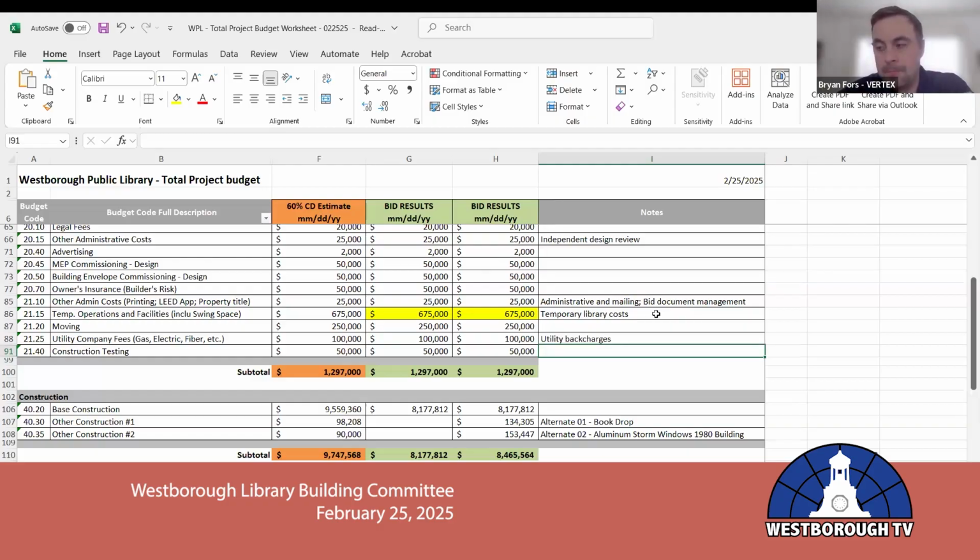I think one thing we needed that I didn't say, but we would need to account for, would be, worst case scenario, that an entire new fire alarm panel would need to be installed for this facility. And we would coordinate with the community and senior center project to make sure that they're aware of what's being put in at that point. So if the upfront cost needs to come from us in order to get the temporary occupancy, the town wouldn't be paying double for both projects.